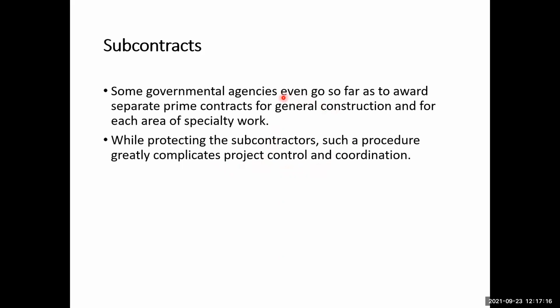Since in this case, there will be several contracts between the owner and the contractor. So owner and contractor 1, owner and contractor 2, owner and contractor 3, etc. So this will be a different type of arrangement, and it will greatly complicate the project control and coordination.